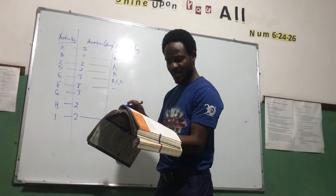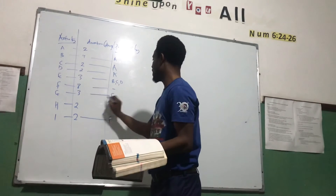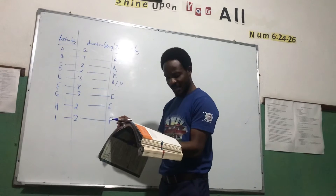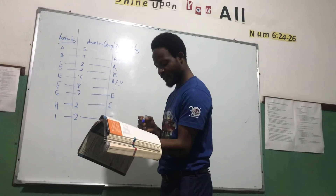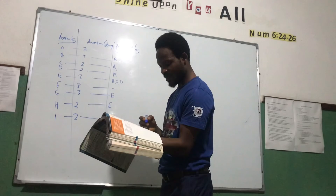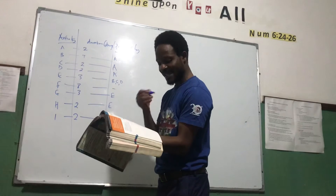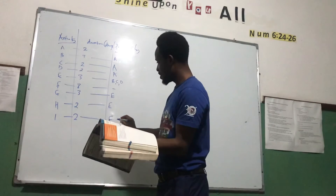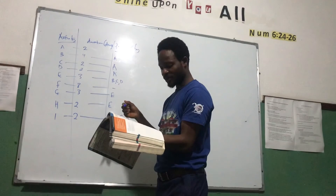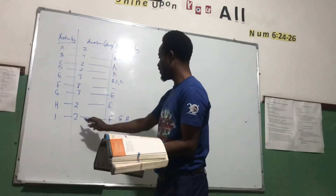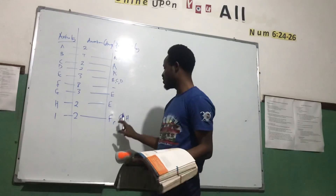G and H follow E. Then lastly, I follows G and H. Looking at the second-to-last and last statements, F must also be completed before I can commence. So technically, I follows F, G, and H.